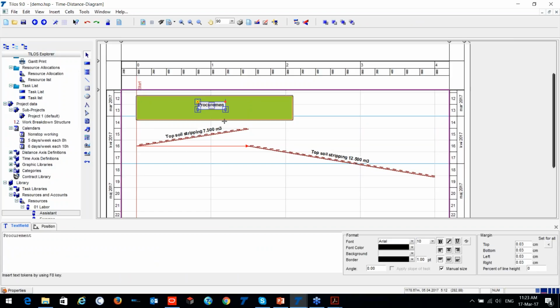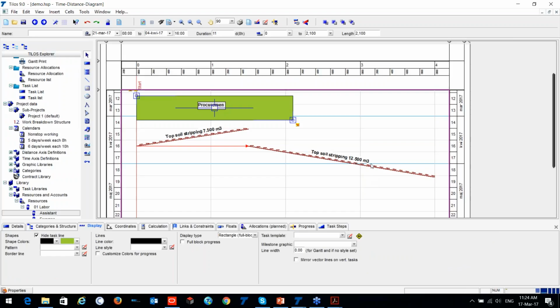So this time we'll take out the procurement, for instance. It is also possible in this way to display the delays. So it can be the design delay or the procurement delay. And when you have the question why we have the delay on this specific area or specific task, why our activity is not started, you can easily print out this view and give it to them to say that, you see, this is the procurement delay or the design delay. It is possible to have it.